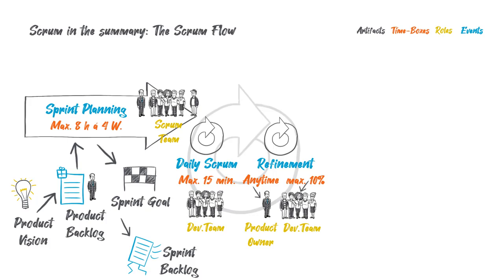First, the product owner prioritizes the requirements with the help of the development team and possibly a stakeholder, for example, the customer. The stakeholder indicates the value of a requirement to him. This and other factors are the basis for the product owner's prioritization. The next step is to detail the requirements. The requirements must be sufficiently understood. The product owner can find out what exactly the development team needs to understand a requirement or to start working on it in the definition of ready.